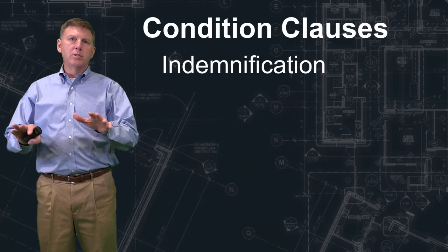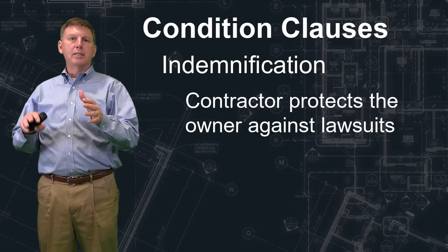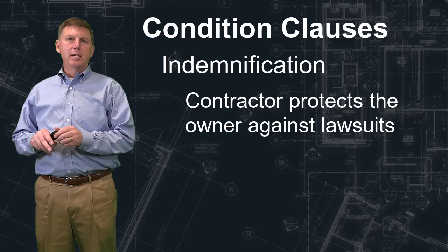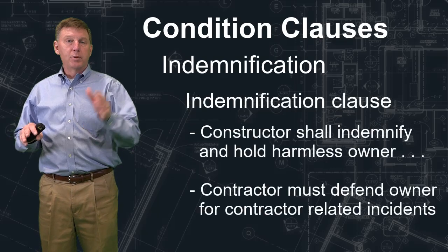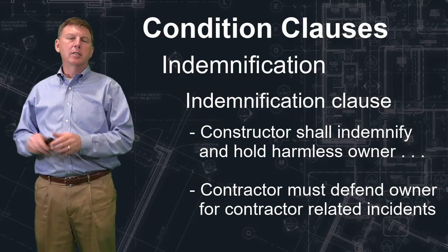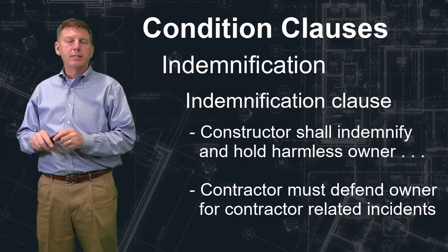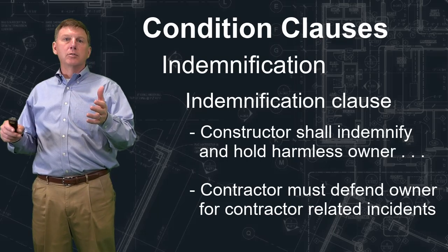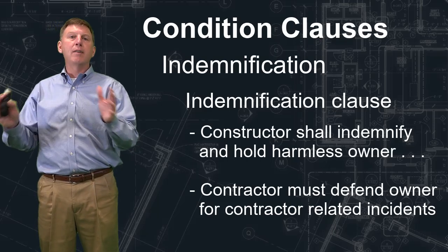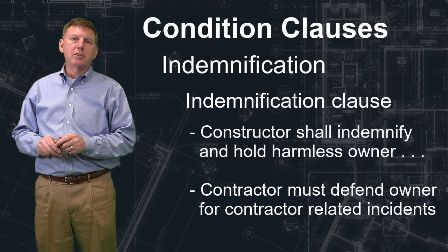There is a clause in the general or the supplementary conditions that's going to protect an owner against a lawsuit caused by something that may occur on the project. That clause is called indemnification. And you're going to indemnify or protect the owner against a lawsuit for some action that may occur that results in a lawsuit. You could be driving a truck onto the site, and you can actually hit another car, not related to the project, and let's say that person's sued. Well, they're not going to just sue you as a contractor. That's not the way lawsuits work. Lawsuits name everybody. So they're going to sue the contractor, they're going to sue the owner, and they may sue some subcontractors as well.